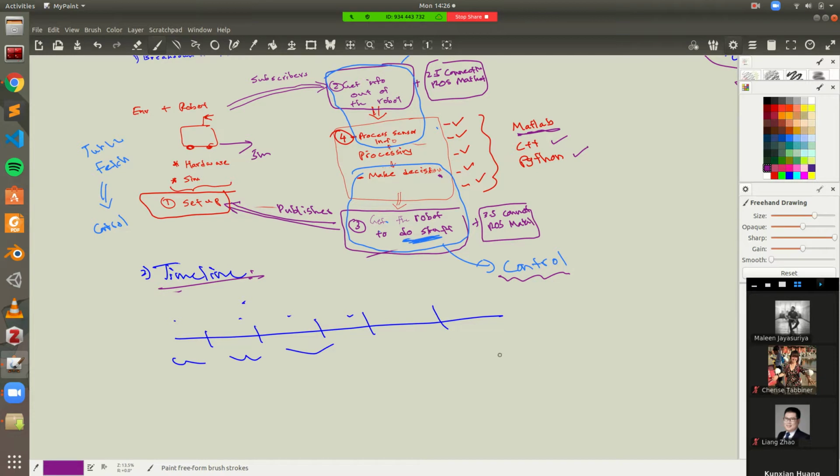One important thing when you're making the timeline is to be aware of what's called the planning fallacy, which is basically that humans tend to underestimate how much time something is going to take. This has been seen in a lot of government infrastructure projects, like whenever a new highway needs to be built, it usually takes several months or sometimes even years more than originally planned, and way more money than originally planned, right? So give yourself plenty of time. Make sure you start now.